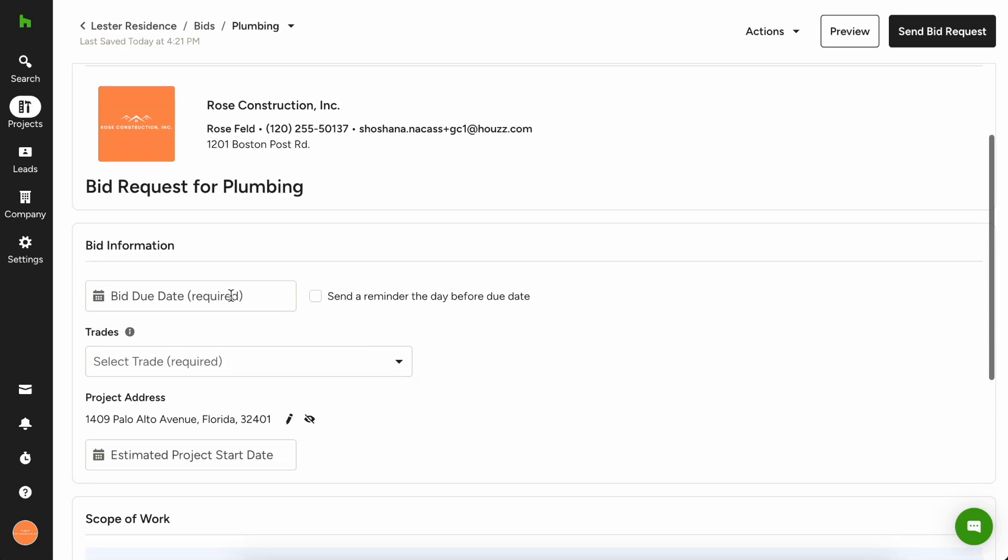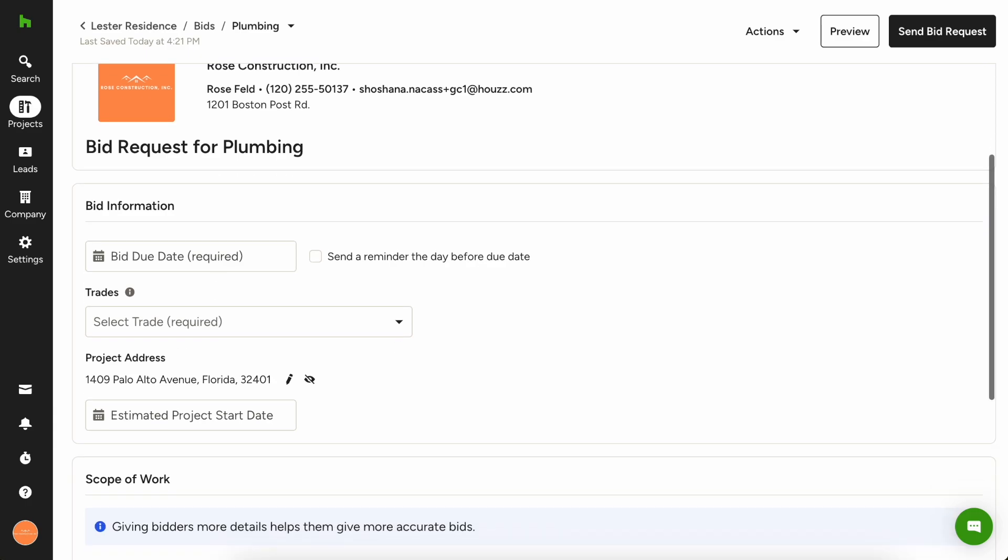You're gonna want to fill out the bid due date, select the relevant trades, verify or edit the project site address, choose an estimated start date, and describe the scope of work. So let's go ahead and do that now.